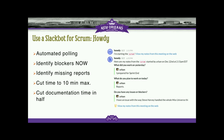One other thing: the standard scrum model asks what was I working on yesterday, what am I working on today, what am I planning on tomorrow, do I have any blockers? Another question you can add is whether someone needs a minute after the call with a product owner or another developer. Since everybody's already on the call, this is a quick way to say 'I just have a quick question — give me a minute at the end.' So everybody can see what's going on.